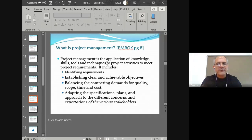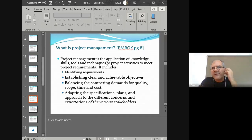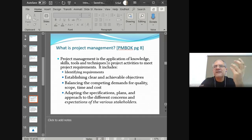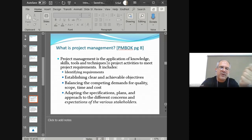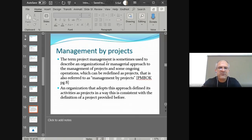We also have to make sure that while managing the project we are adaptive. As things change, unexpected things will pop up and new problems will arise, so we need to adapt our plans so the project doesn't become stale but continues. There's also the idea of stakeholders — people who are directly or indirectly affected by the project. If we miss a key stakeholder and they later show up with unmet requirements, the project failed to do its job. A project should be able to adapt its specifications and plans to meet the expectations of all internal and external stakeholders.